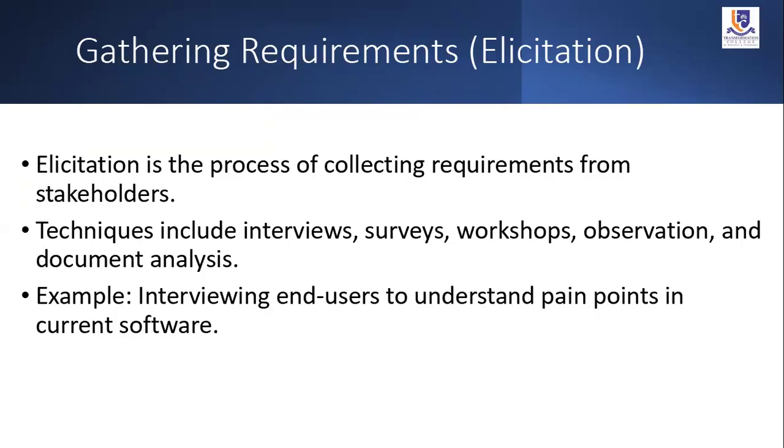Sit with these stakeholders, ask the right questions, document what was gotten. Create a survey, send it to them, get their feedback. It will guide clarity. It will help put clarity to the requirement. Hold a workshop session where you take them through some user stories, build up a use case. All these things are techniques for you to be able to gather these requirements.